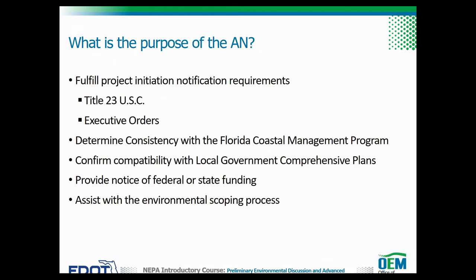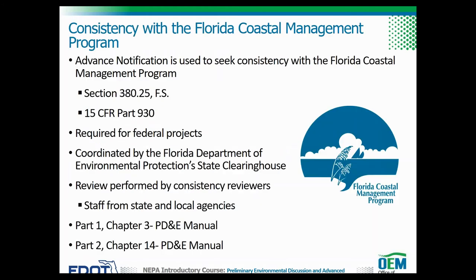What is the purpose of the AN? The AN fulfills project initiation notification requirements stipulated in Title 23 U.S.C. and Presidential Executive Orders. The AN also initiates the Florida Coastal Management Program Consistency Review, confirms compatibility with local government comprehensive plans, provides notice of federal or state funding, and assists with the environmental scoping process.